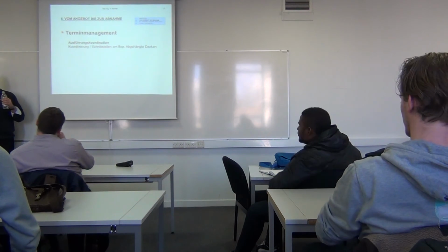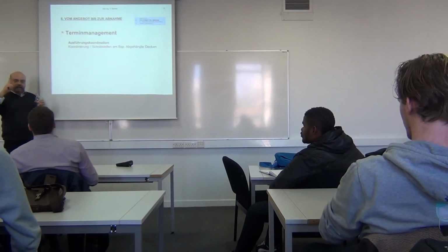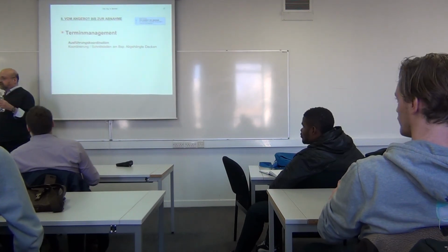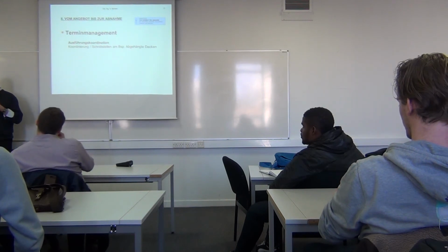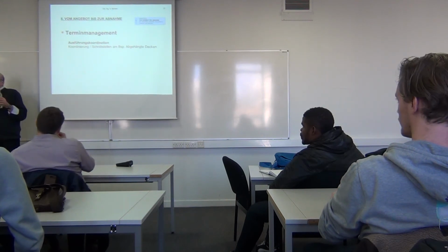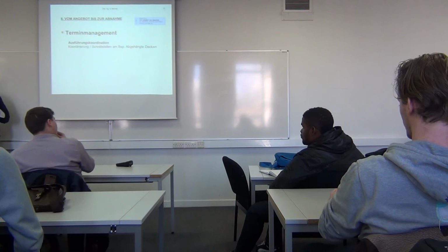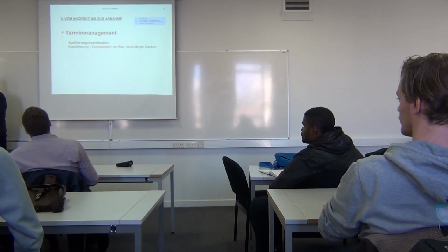Only if one bidder would say, okay, I need one more month, then I could be cheaper, then the client would think about it, because maybe for him the time limit is not as important as the price. Maybe if there would be a reduction of 3% or so, and it would be delivered one month later, it would be interesting from the side of the client, maybe.